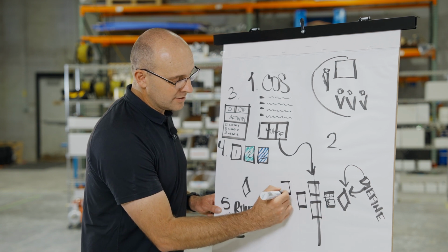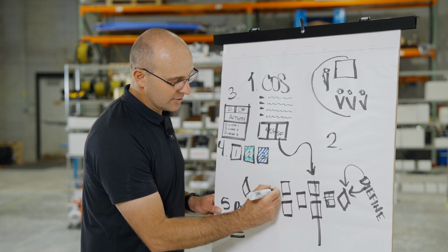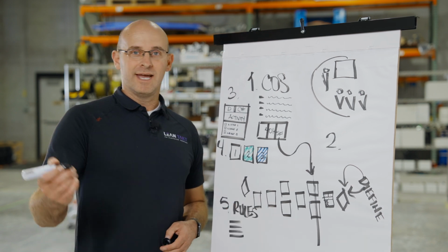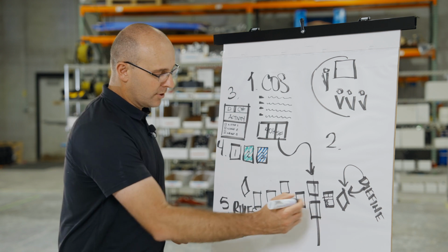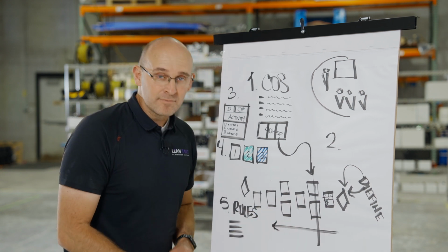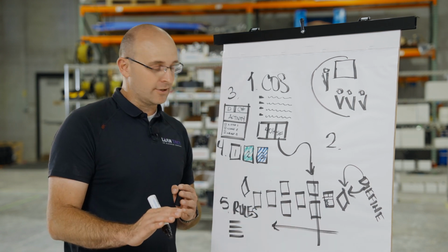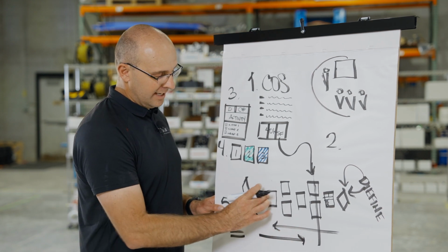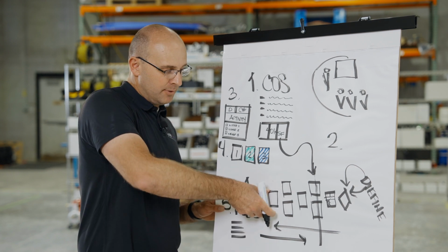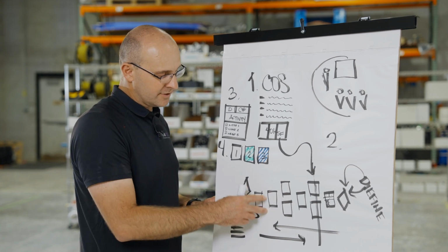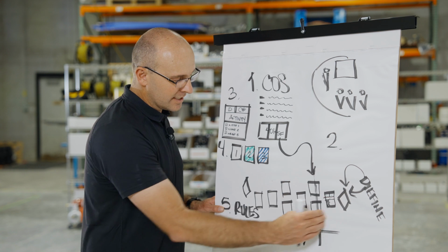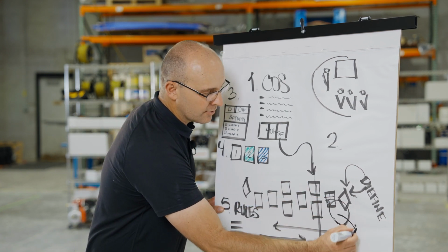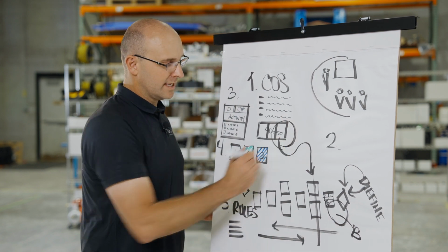So in marriages and in pull plans, we must make sure that everyone's needs are met in order to have a happy pull plan, happy job, and in the analogy, a happy marriage. So we work that backwards. Then, and I'll be brief with this because you likely already know, you can do a forward pass and make sure, hey, this is a finish to start. Can they be parallelized? Can they go on top of each other? Is there anything in here that can be optimized? And have we gained time before that milestone as a buffer according to that one zone?